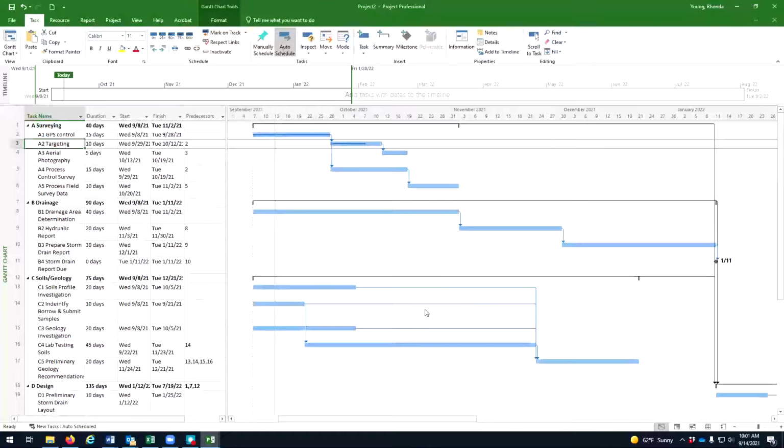And then the last one: the survey department is running with fewer survey crews than usual and would like to know how long they can delay. That's this idea of float, right? We have 50 days. So you can let the survey crews delay up to 50 days without impacting the overall project.